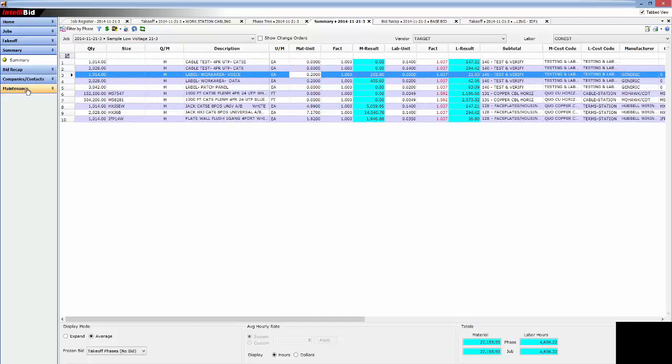You can store prices in the database to have some standard prices, but project pricing usually is a requirement on every job. And if this job is negotiated over the next 3, 4, 5, 6, 8 months, or maybe shelved during that period, when you come back into that project 6, 8 months, the project price that you used would have been intact.